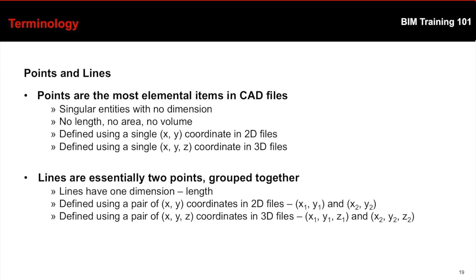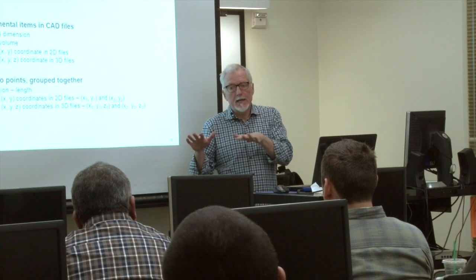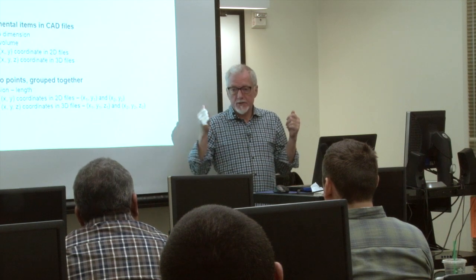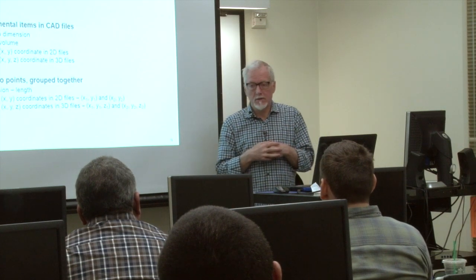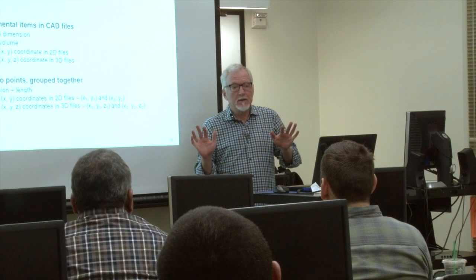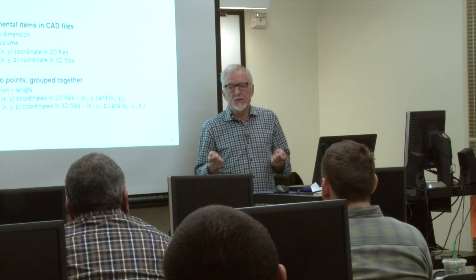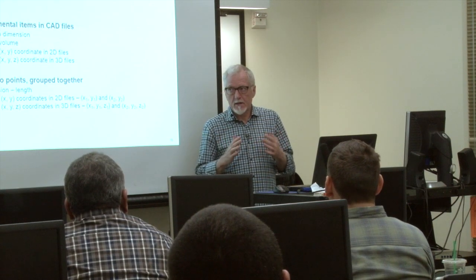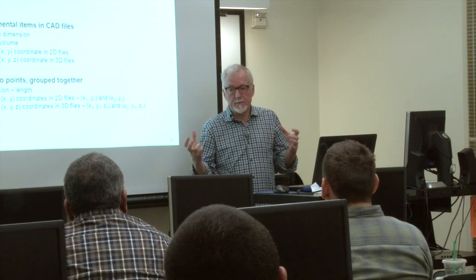Any questions? Good. So the drawings in a BIM environment are produced from the model. And so they're kind of like a report of what's in the model. If you're an estimator, you can do takeoffs from the drawings, or you can do takeoffs from the model. And it's more like an and, because there are certain things like carpet or paint finishes, like colors, that aren't usually in a model. They're usually just a key plan of finish types and things like that. So you would need to do those from the drawings. Things that are solid, like volumes of concrete, or where you want surface areas, like surface areas of drywall or wall assemblies, you can get from the model.